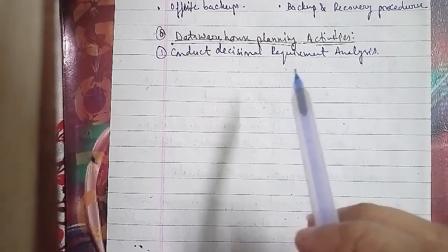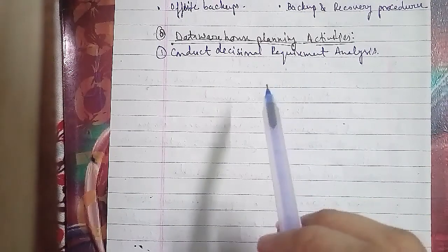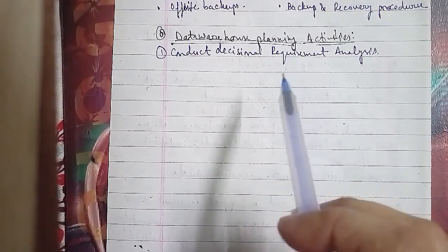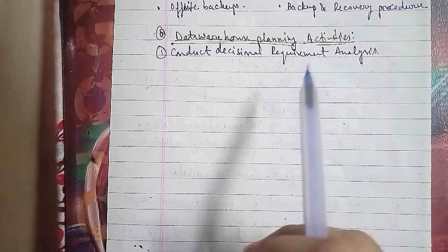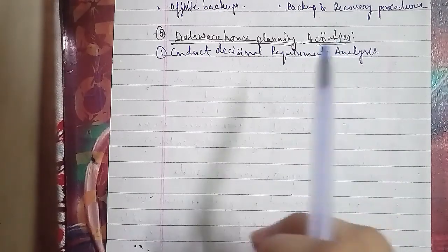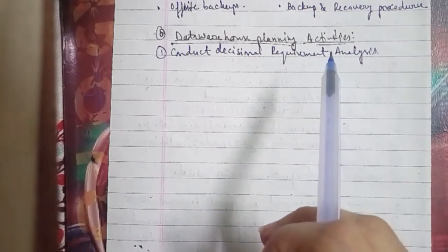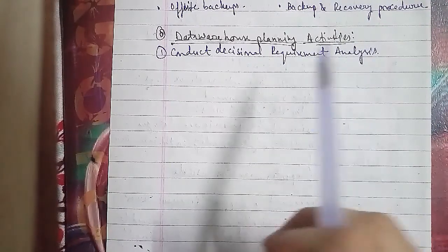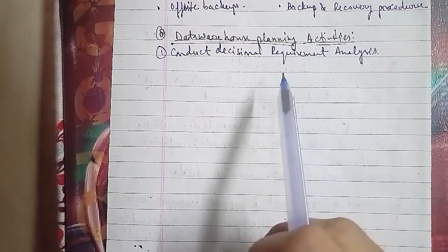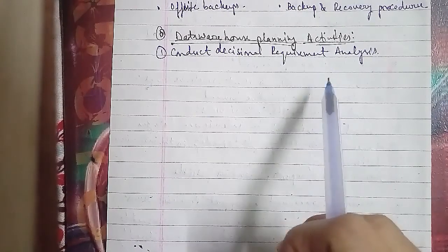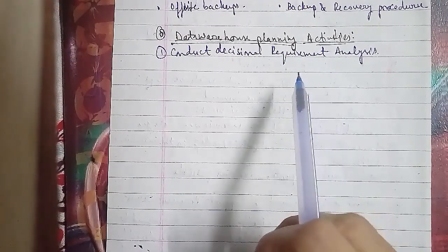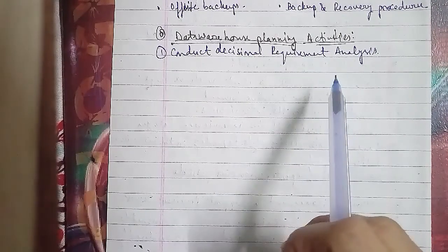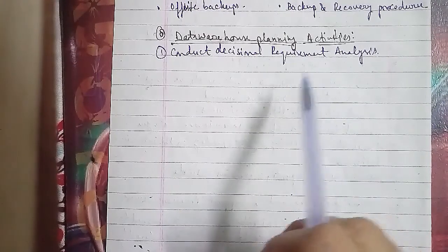starting point of the decisional requirement analysis and the preliminary analysis that should have been conducted as part of the warehouse strategy formulation. Review the intended scope of the warehouse rollout as documented in the warehouse strategies document, and finalize this scope by further detailing the preliminary decisional requirement analysis. It will be necessary to revisit the user representatives, and the rollout scope is typically expressed in terms of the queries or reports that are to be supported by the warehouse by the end of the rollout.